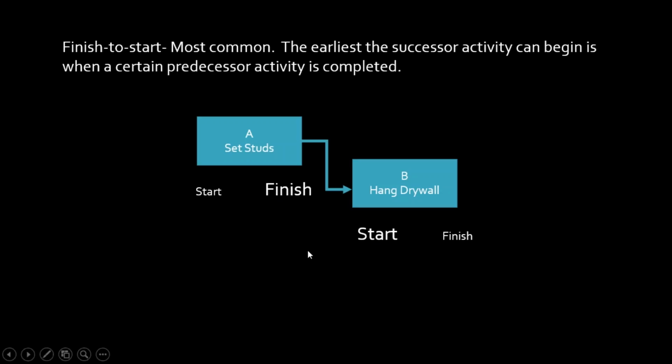That's where you come up with, and on a network diagram, the acronym is FS, finish to start. This means that I can't start task B until I've finished task A. Again, this is the most common of the four dependencies I'm going to show you. And in this case, it looks like it's going to be a mandatory dependency. Not necessarily, but we as project managers are going to look at it.